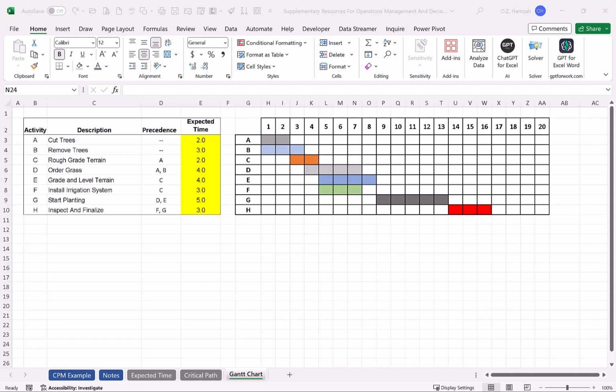So certain activities, visually inspecting them, you could tell that they're shrinking, or they're crashing, as we say in project management. Finishing them in less time may not help. That really guides our decision on where to put our resources. We should not put any resources to finish activities that do not influence the faster completion time.